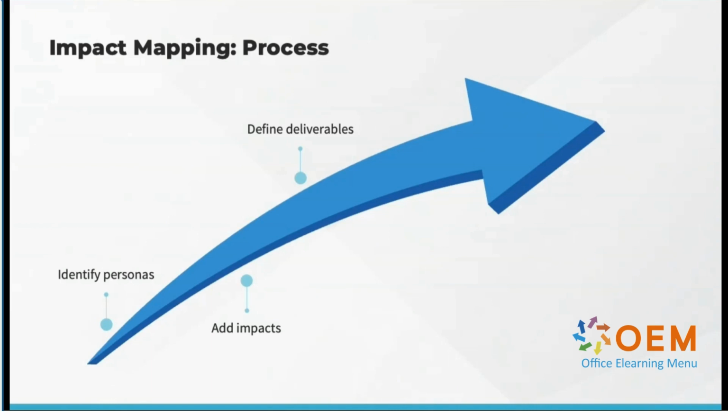Note that deliverables are not always software deliverables. You can think of deliverables as responses that affect impacts in some way. The next step would be to create user stories to fulfill your deliverables, and estimate the effort and/or time for completing those stories. Then you can update your Scrum backlog with those stories, taking action toward achieving the initial goal.